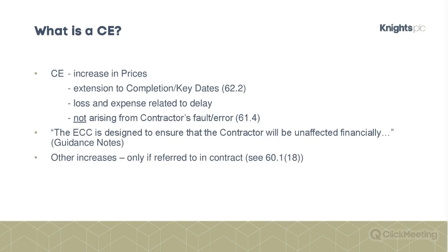any of those elements. This next guidance note, I think, is quite good for contractors. And it's slightly odd wording, but basically the gist of it is contractors are not supposed to be worse off financially as a result of a compensation event, which is why we have this schedule of cost components, as opposed to the mechanism under JCT, where usually you're looking at contract rates.